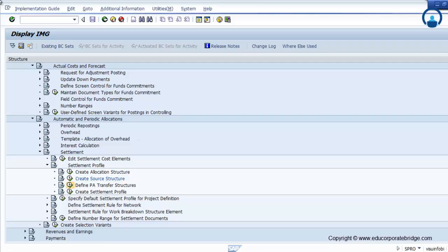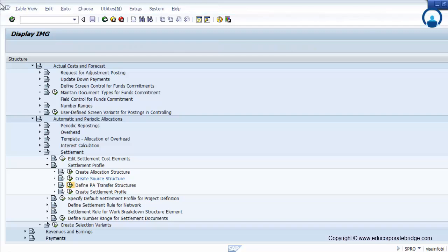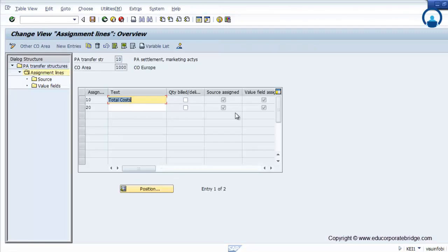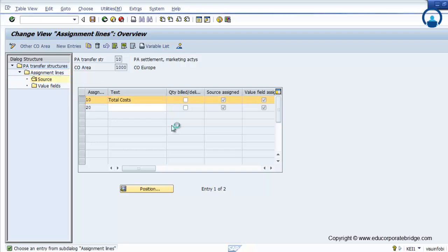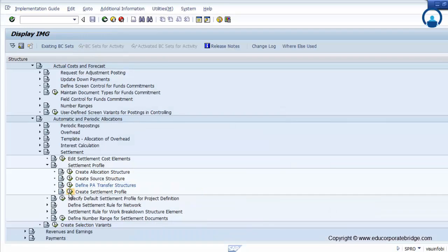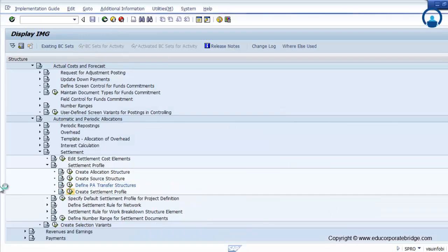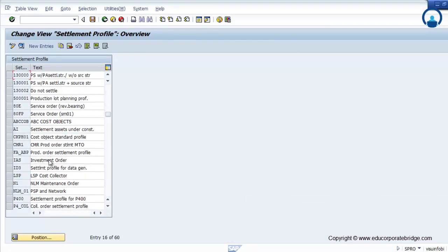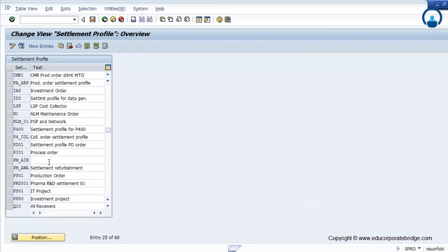Then the PA transfer structure — that is, the Profitability Analysis transfer structure. Again, different costs can be recognized here, and you have to provide the group of that particular cost element as the source. Finally, the settlement profile — you can create your own profile or use the standard profile.